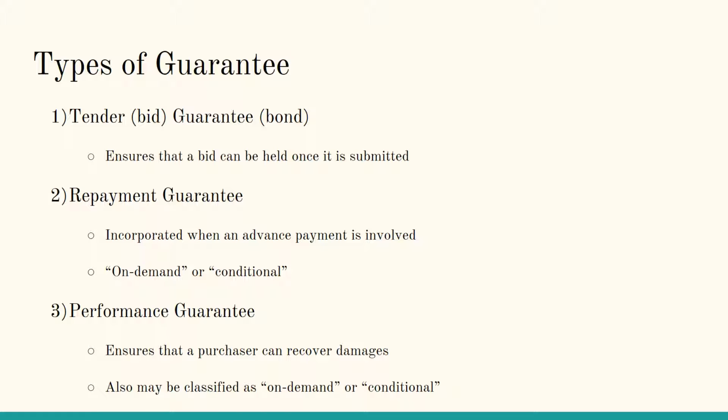A performance guarantee seeks to ensure that a purchaser can recover damages in the event of a supplier's failure to perform. Again, they may be classified as on-demand or conditional.